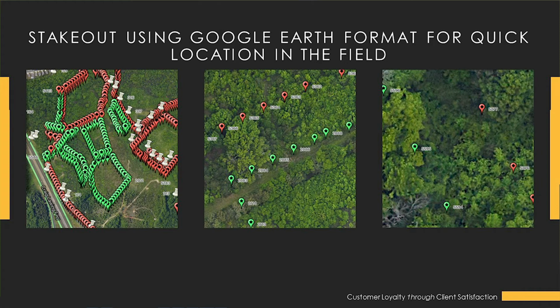The other great thing about this feature that the contractors have really embraced is that, when it comes to clearing limits, we can give real-time updates at the end of every day. The crew's working on clearing limits. We bring in their points, create the map and send it out to the contractor so they know they're around to this point here. You change the icons to green on that operation, and the ones that are left are in red.